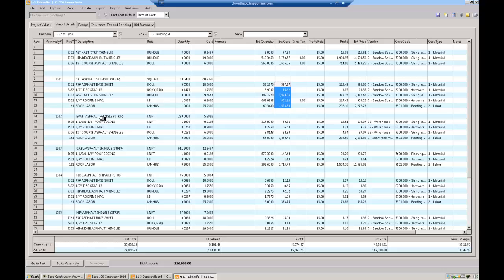Next thing is I have some eaves. How many linear feet of eaves do I have? 289. These are the components for each foot. It makes that same calculation. So the nice part is all I am dropping in is here. It becomes very consistent from estimate to estimate. We don't miss things. We don't leave things out.